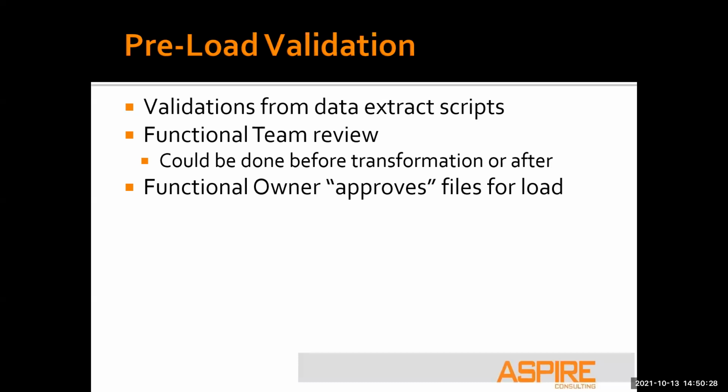If we're looking at a hire file and I've pulled 100 records in a hire file, and I give that to my HCM core functional lead and say, here's the data for the hire file, and they go, wait, hang on a second. There's only 100 records here. We have 3,000 employees. Something's wrong, right? And I go, oh, yeah, I didn't notice that. So it's a second set of eyes to look at it before it goes over to Workday or to the